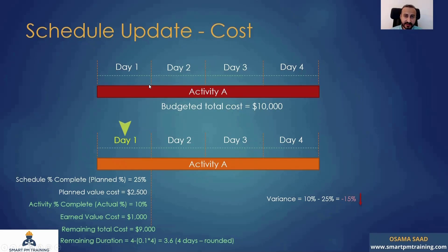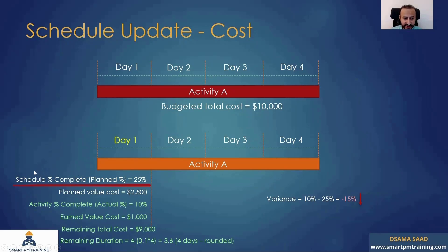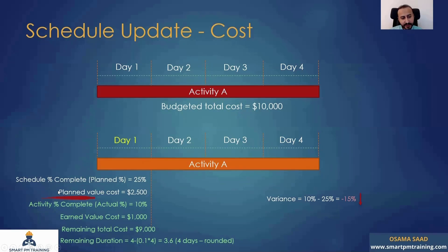After one day, I want to check the progress of that activity. You want to refer to the schedule percentage complete. If you search for this column, you're going to have schedule percentage complete or planned percentage. It's 25% because one day elapsed out of four. So 25% should have been completed. The planned value cost is 25% times $10,000 total cost, so I should have done work worth $2,500.